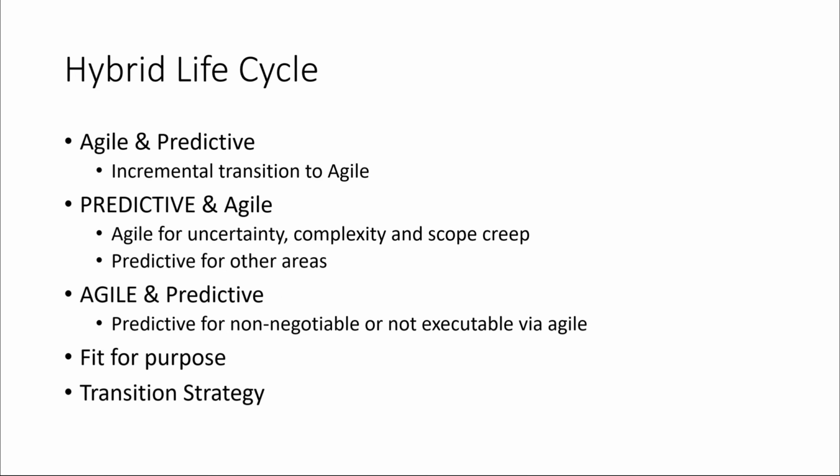Combined agile and predictive approaches. Another approach is to use a combination of agile and predictive approaches throughout the lifecycle. In Figure 3-7 on page number 27, a combination of both predictive and agile approaches are used in the same project. Perhaps the team is incrementally transitioning to agile and using some approaches like short iterations, daily stand-ups, and retrospectives, but other aspects of the project such as upfront estimation, work assignments, and progress tracking are still following predictive approaches.